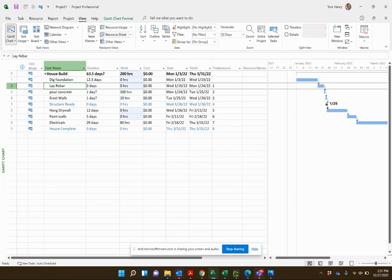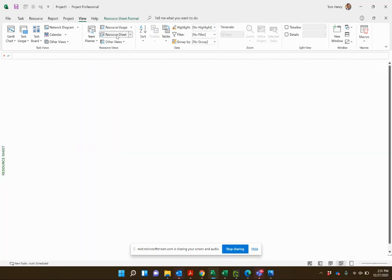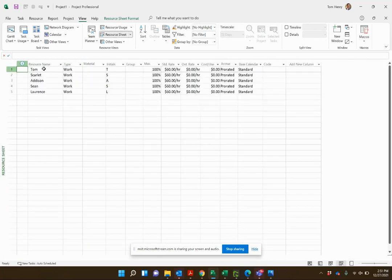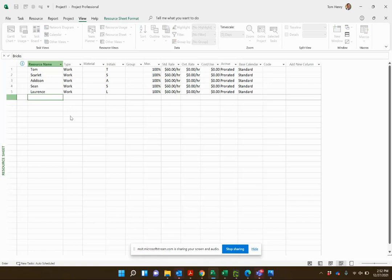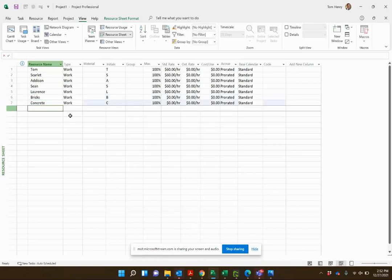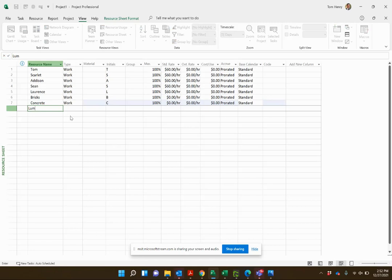Let's go in and build out some material resources. I'm going to go to the resource sheet and in here I can see I have a selection of work resources, those are the people or things that we're using, prorating over time. I'm going to create some material resources now though, so I need bricks, I need concrete, I need lumber.